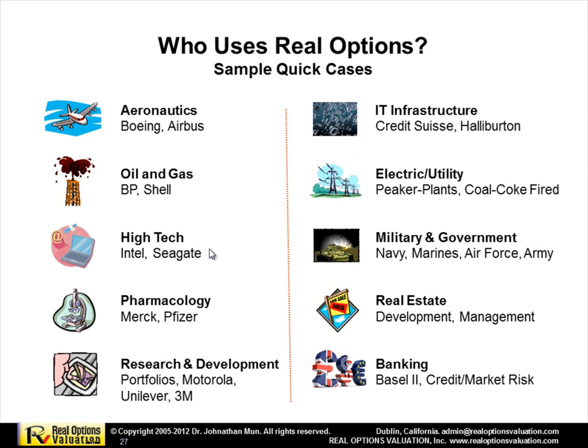So the option to expand is to develop a larger platform than required, which temporarily is sitting idle until the time when the price of oil is so high, or extremely high, that the expansion option is executed and the additional facility is expanded. So you're building this Project Atlantis at size X by Y square meters. But how much does it cost, if it costs you anything extra, to build a slightly larger platform, which you don't need at this point?